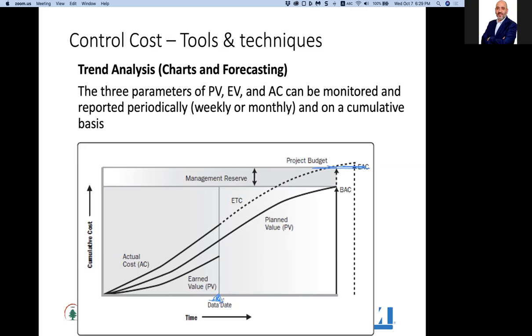شو كمان اليوم؟ اليوم نحن behind schedule ahead of schedule. والشغل صرنا عاملين نصه، ما فيك تعرف ليش. ايه لا نحن مأخرين عن الشغل، البلاند فاليو مأخرين بالشغل لانه الايرند فاليو هي اوطى من البلاند فاليو اللي هي هاي. يعني هيدا كله هو شغل كان مفروض نشتغله ما اشتغلناه.